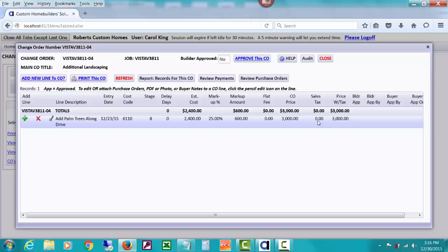Since I unapproved this particular change order, it will not show up for this cost code on the estimated cost of completion. It will not show up on draw requests that we've been going through talking about payments. The only time these show up on all sorts of various other places, job cost comparison, revised budgets, etc., is if the change order has been approved.